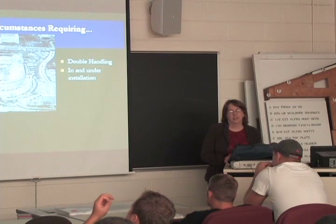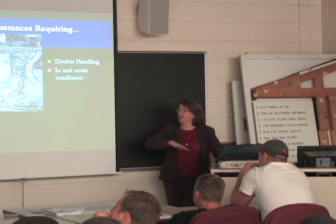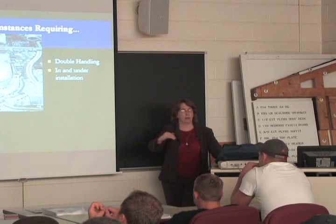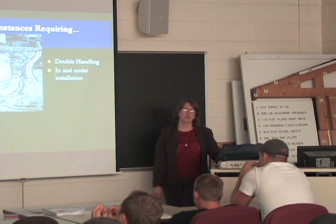Now, I did have a precaster up in Milwaukee. Have you ever been up there and seen the river walk that they've built that comes out on the river? That uses all double T's. And that was actually an FOB. They just took the precast to the site and dropped it at the riverbank, and then a barge came in and they barged it out to the site and placed it in. But the precaster didn't want anything to do with it. He just didn't feel like he knew enough about barges and water to get that erection. So that was a specialty erector. But I've never heard of anybody using helicopters for it.